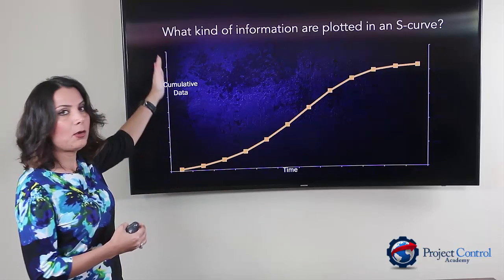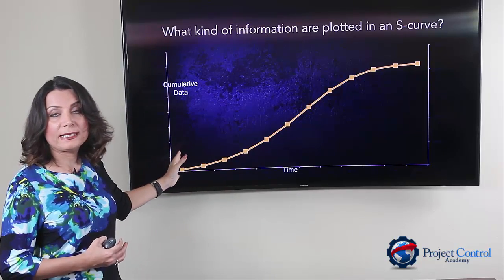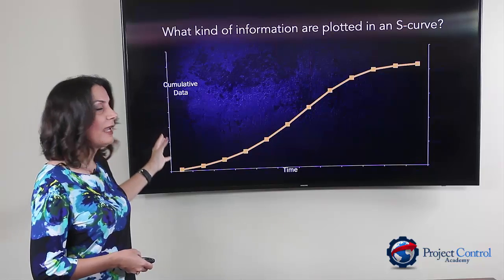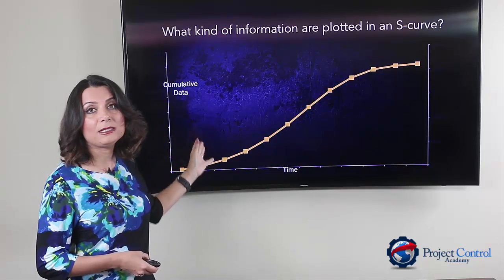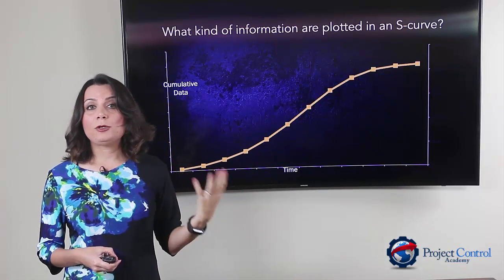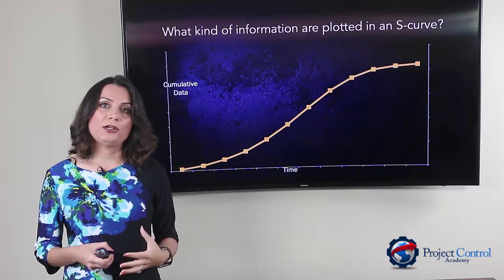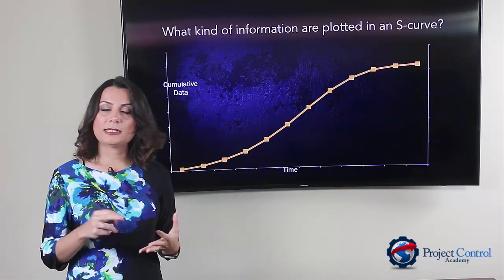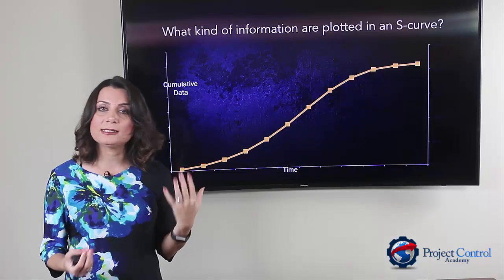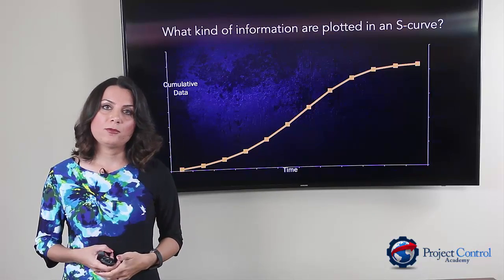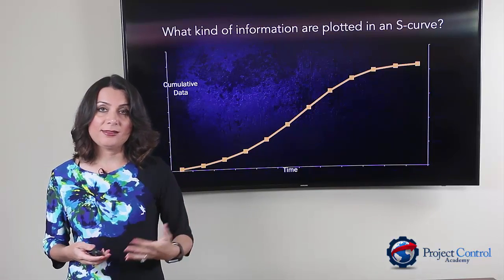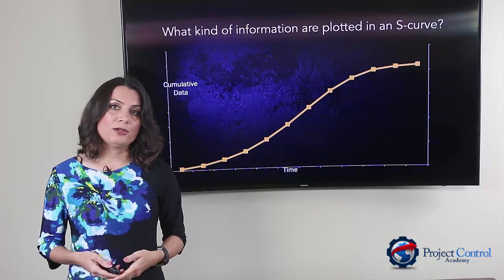The Y-axis always shows cumulative data. The cumulative data can be different types of data that you want to show and plot in a project — it can be manpower, cost, FTE, progress, quantity, resources, or different types of information that you want to analyze.